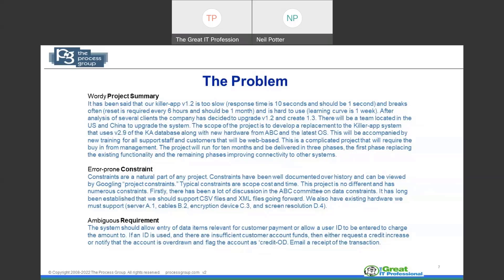For example, line three says 'after analysis of several clients, the company has decided to upgrade to 1.2 and create 1.3, and the team will be located in the US and China.' There's a lot of extra fluff in the paragraph. If you really wanted a quick read of what it actually was, you'd have to print it off or use a digital highlight pen to figure out what's going on. If you take that paragraph and replicate it maybe 10 or 15 times over 10 or 15 pages, that becomes a project plan — and you can see that this narrative style text can really become overwhelming.